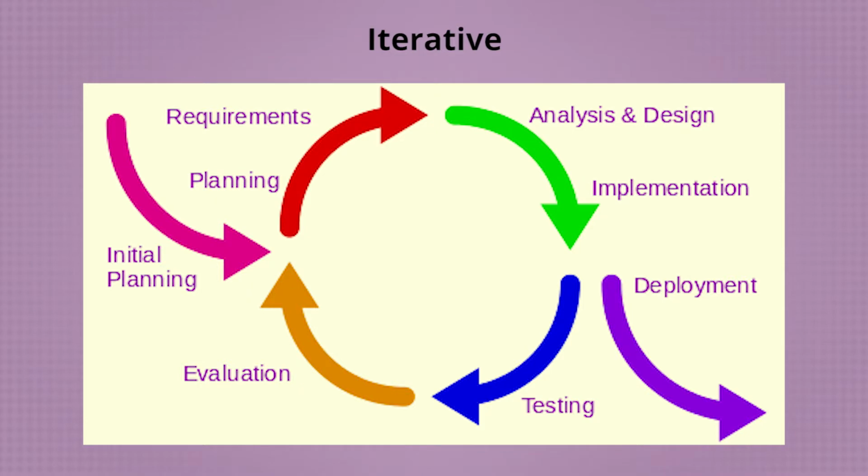You can think of it as a way of decomposing a large set of application requirements into smaller chunks or features. And these chunks of features are delivered over time through iterations. So in iterative development, these features are, again, designed, developed, and tested in repeated cycles, and at the end of each cycle, that slice of functionality is released.